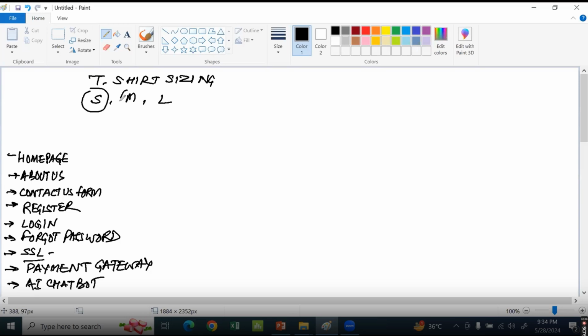A medium user story will be called not that simple, but not too complicated either. Large is very, very complex. And you could have an extra large also, which is very, very complicated and a lot of work will be required. So we get all the domain experts and the technical team sitting together. Remember, the team is the one who takes the decision. So we pick up a user story and I'm going to ask you all your opinion, what will you call this? Typically, what you mean by small is that to develop this user story, it's pretty simple, easy.